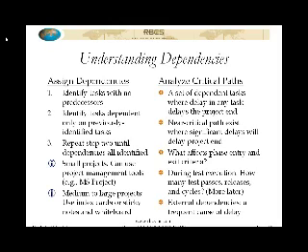So having established the dependencies, we can now look at the critical path. And so the critical path is just a fancy way of saying a sequence of tasks where if any task slips, that's going to cause the end date to slip, because that slip is just going to rattle along through those dependencies, and ultimately the last task to finish is dependent all the way along that chain, so it will slide out.